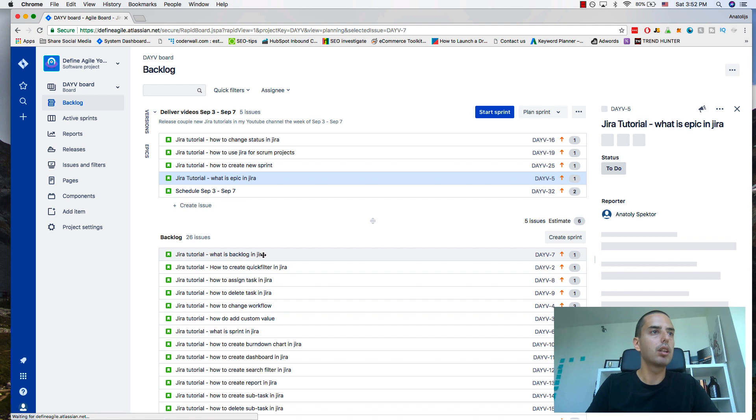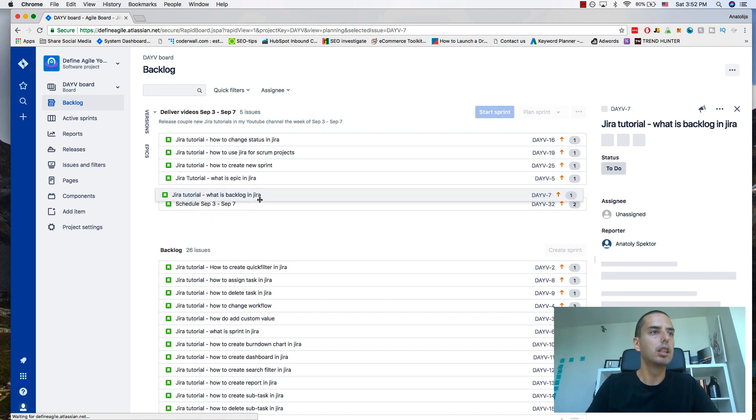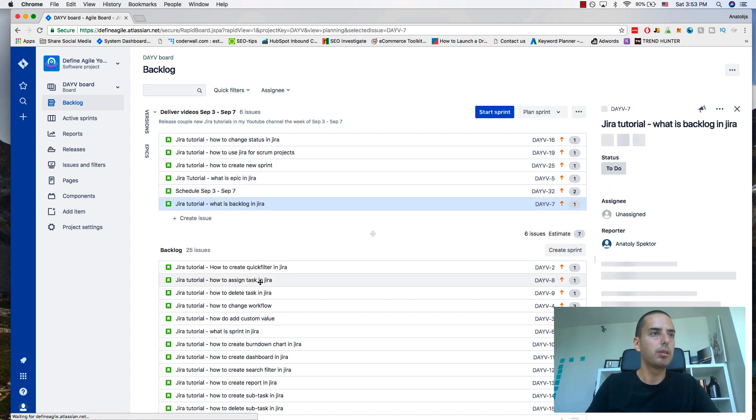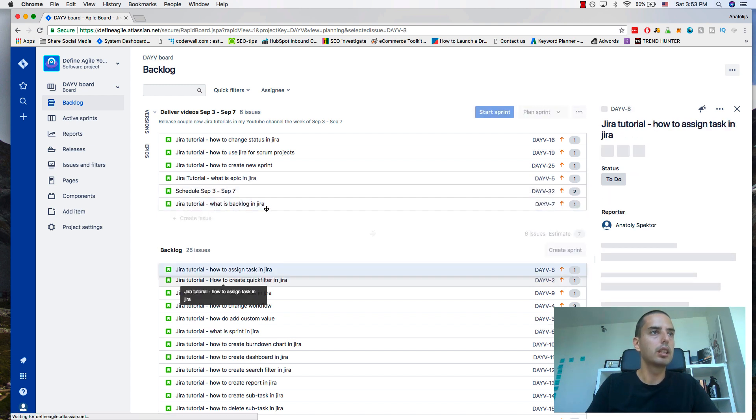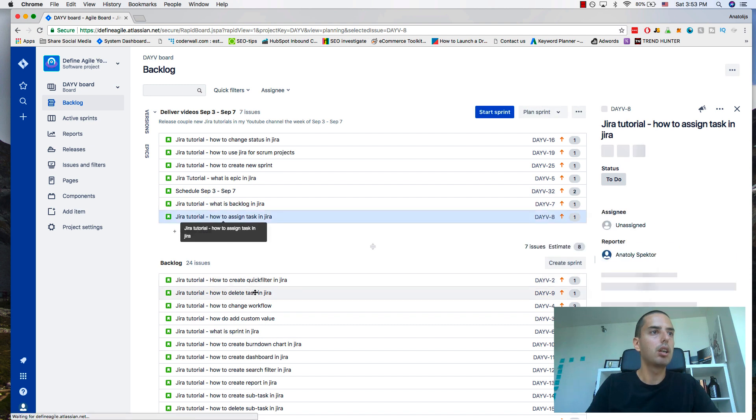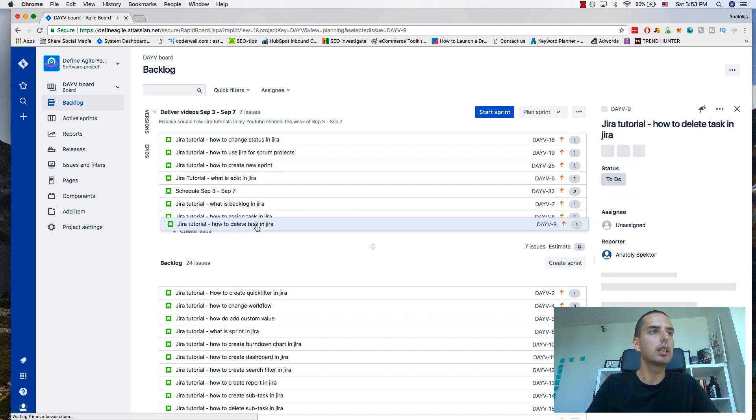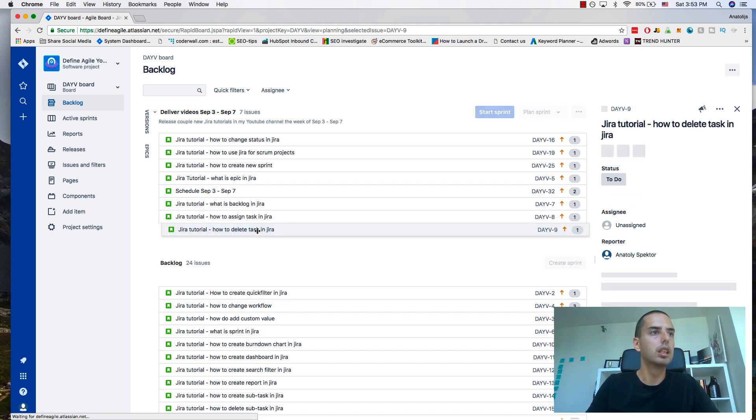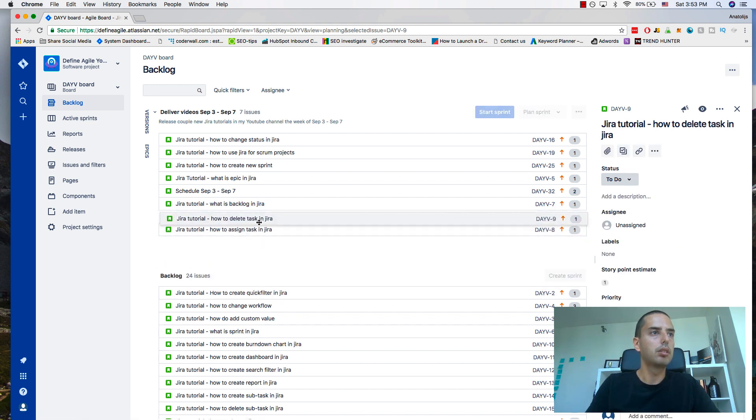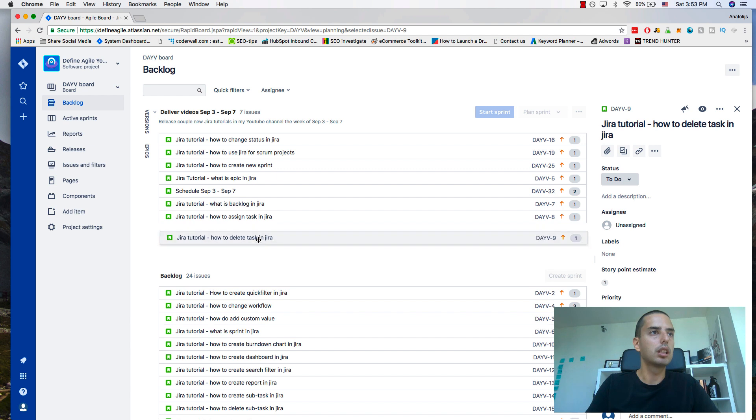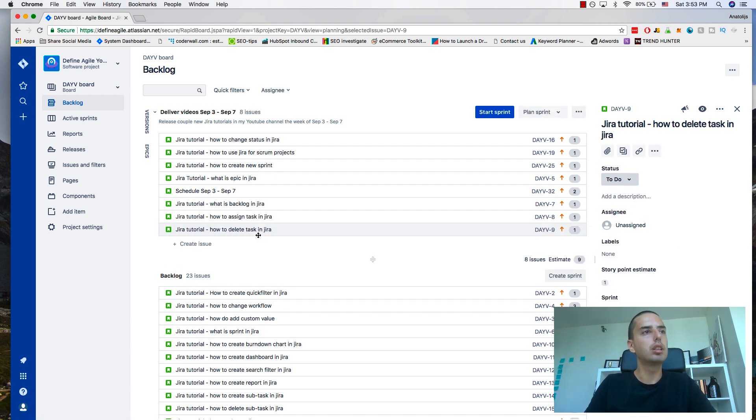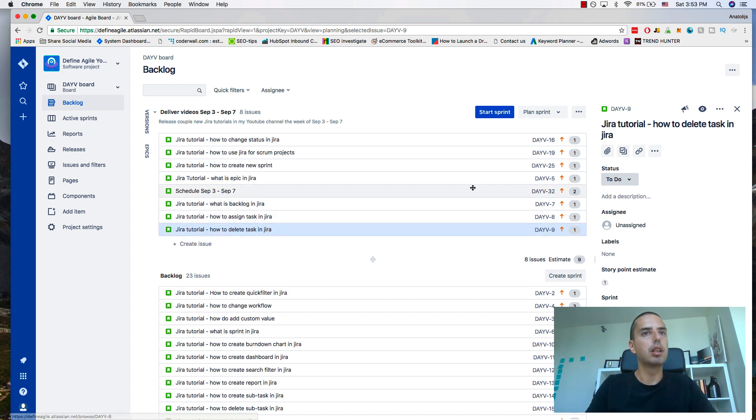What is backlog in Jira, how to assign task in Jira, how to delete task in Jira. If you want to create issues right in your sprint, you can click on create issue. It will create your issue right in the sprint. But for now, this is what I'm planning to do the week from September 3rd to September 7th.